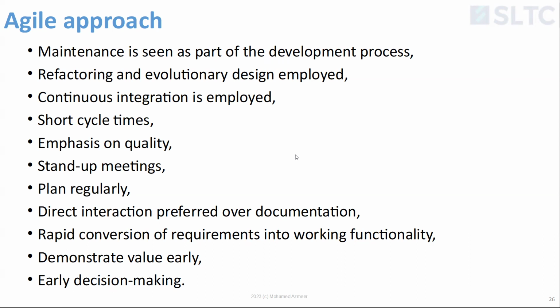There are also something called stand-up meetings, where every day morning, let's say 8 to 8:30, very short time, not hours, there are short meetings between teams or within the team, actually, right? And they talk about, okay, what happened yesterday and what is the plan for today? What are the issues they face? How can we solve it? For today, only one day they discuss, not for the next 1 month or week or whatever. What can we do today? That's all we talk. Right?